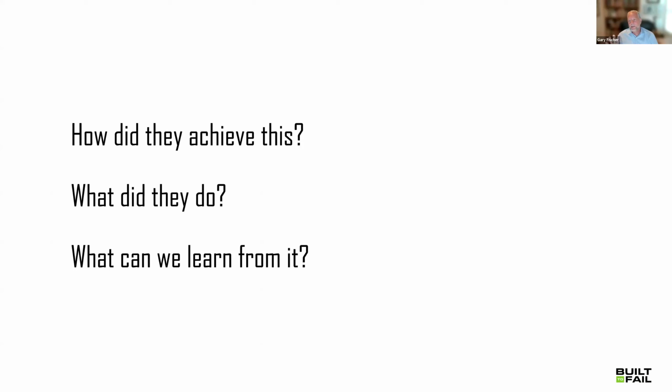And I think it's important, as we dive into this with our panel, that T5 was really the first large-scale application of what lean construction was intended to be. Relational contracting, first application of last planner, first application of production control, really first to take a systems approach on a mega project. So today we're really privileged to have a panel of gentlemen who all played significant roles in the success of T5.